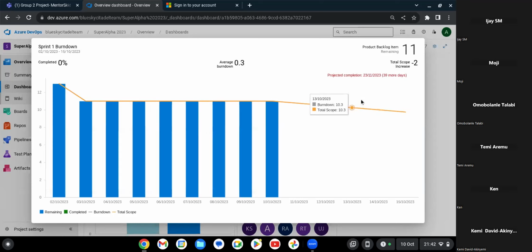So in the real world, if you had a chart like this, would you be worried? Or if you knew what work was being done and that you could wake up in 24 hours and everything is green, would you be worried or concerned? It's not a good pattern when everything turns green on the 14th or on the 15th. It's good because you will say, oh, well, we've completed everything we needed to do. But really, it's not a good pattern because you've left roughly how many days when it's flat.